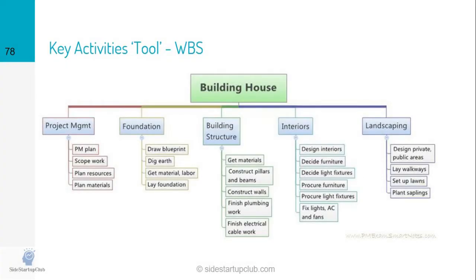And one of the tools that you need to be aware of comes from the engineering discipline. It's called a WBS, or work breakdown structure. And it just means we are going to take a final deliverable, break it into, let's say, mini milestones, and those milestones into tasks, and those tasks will be broken into subtasks, and so on and so forth. And this just helps organize and make sure we account for everything instead of just going at it in kind of a random fashion.